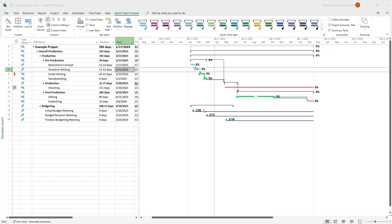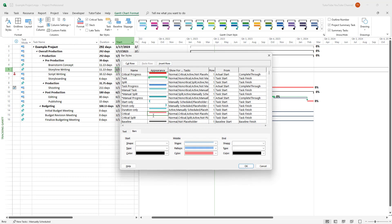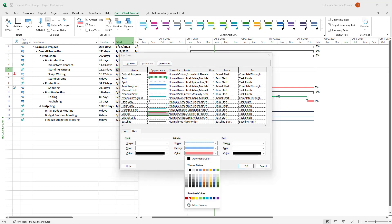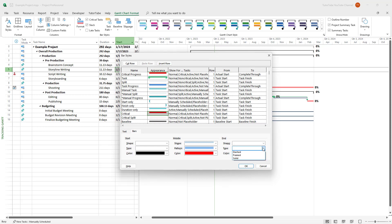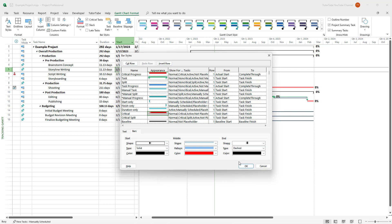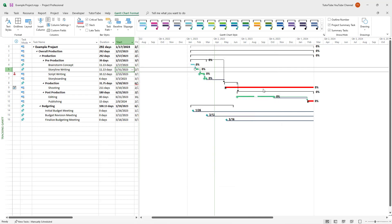Similarly, you can change the critical bars — maybe make them totally red, change the type to 'Dash', and select a style. If you press OK, you can see that they turn red just like that. That is how you change the format of the bars, the bar style, and the bar color inside Microsoft Project's Gantt chart view.